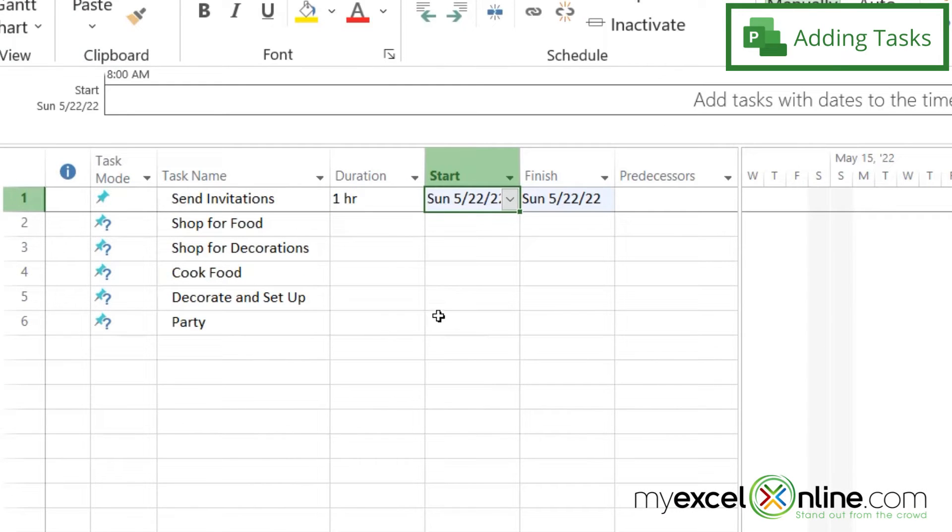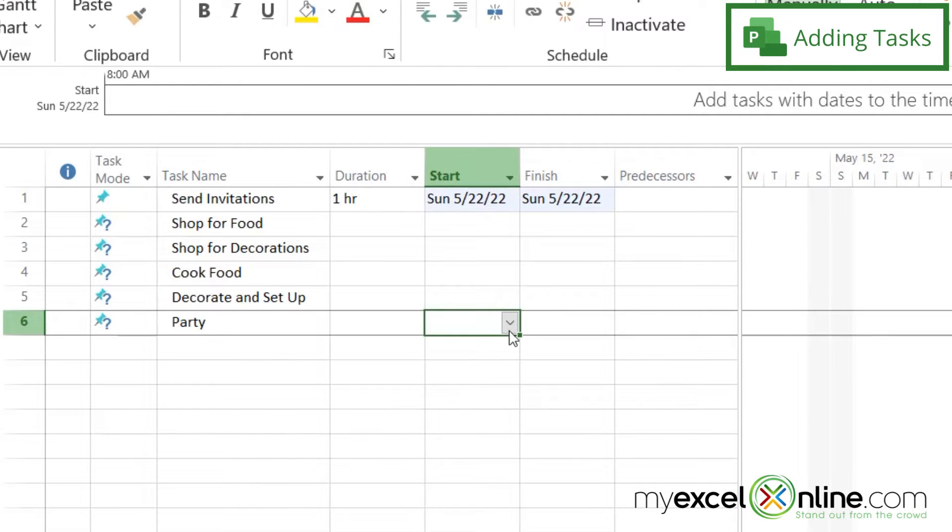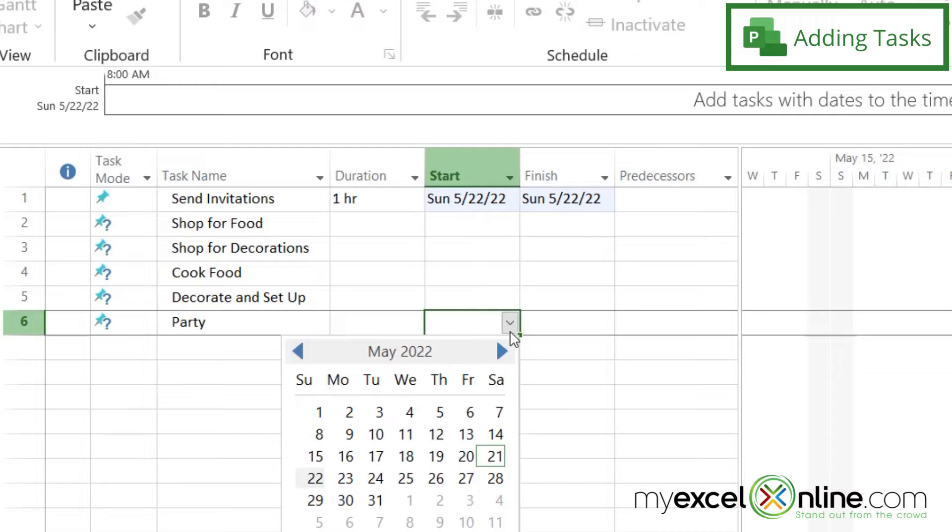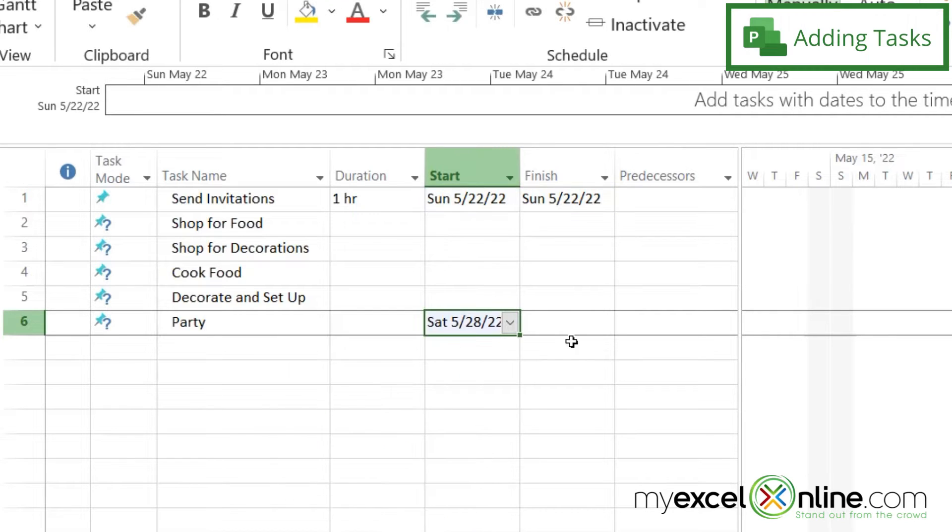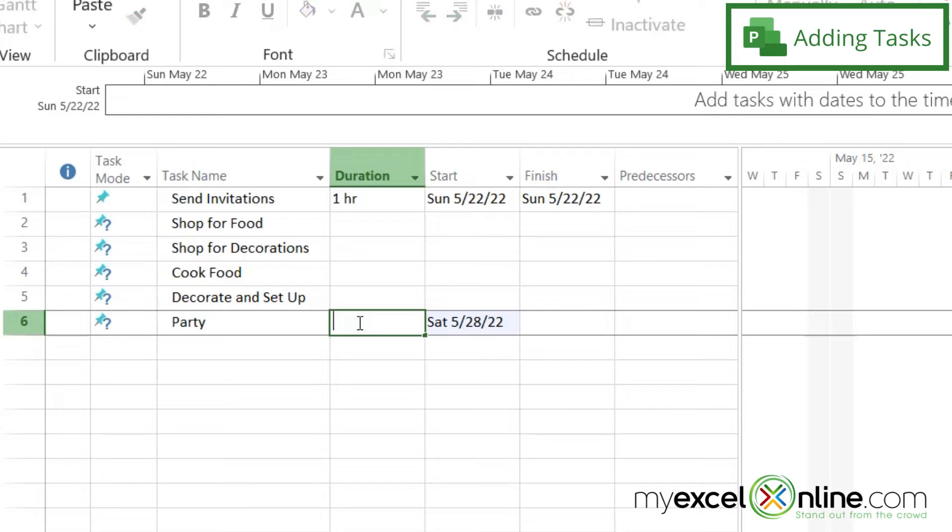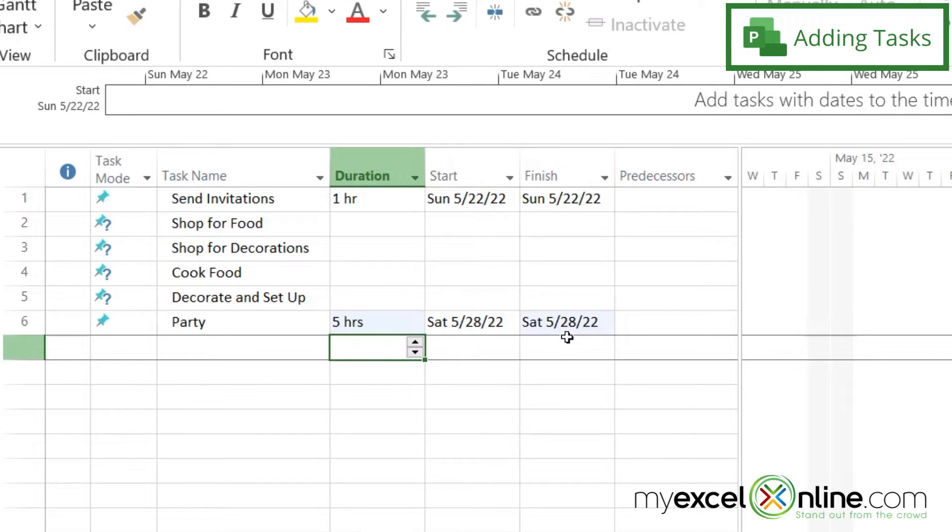But how about my party? Let's say my party is going to be on Saturday the 28th. And I can put a duration in for that too. And I'm just going to type 5H. You can see that the finish date is automatically calculated based on my start time and how many hours.